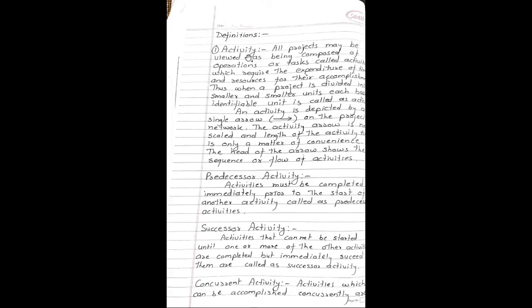Definitions. First definition: Activity. All projects may be viewed as being composed of operations or tasks called activities which require the expenditure of time and resources for their accomplishment. Thus, when a project is divided into smaller and smaller units, each basic identifiable unit is called as activity. An activity is depicted by a single arrow on the project network. The activity arrow is not scaled and length of the activity time is only a matter of convenience. The head of the arrows shows the sequence or flow of the activities.